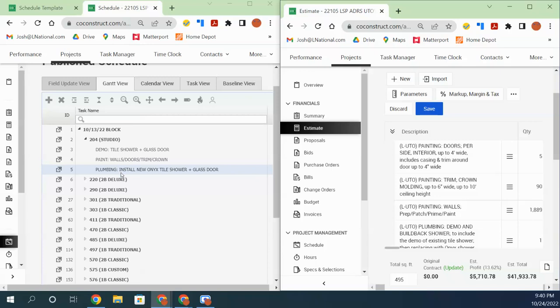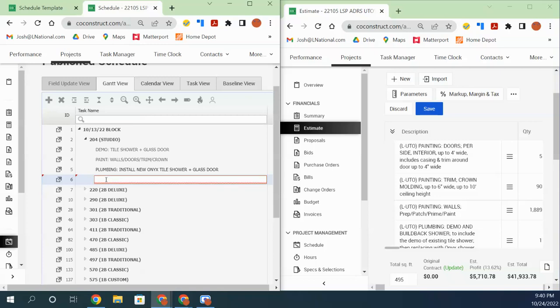Okay. If the arrival of a material item is very important, that would be a critical path item. Then go ahead, you can put in the delivery of that material as a line item. So, for instance, let's see, a task below, you might put, caps lock.